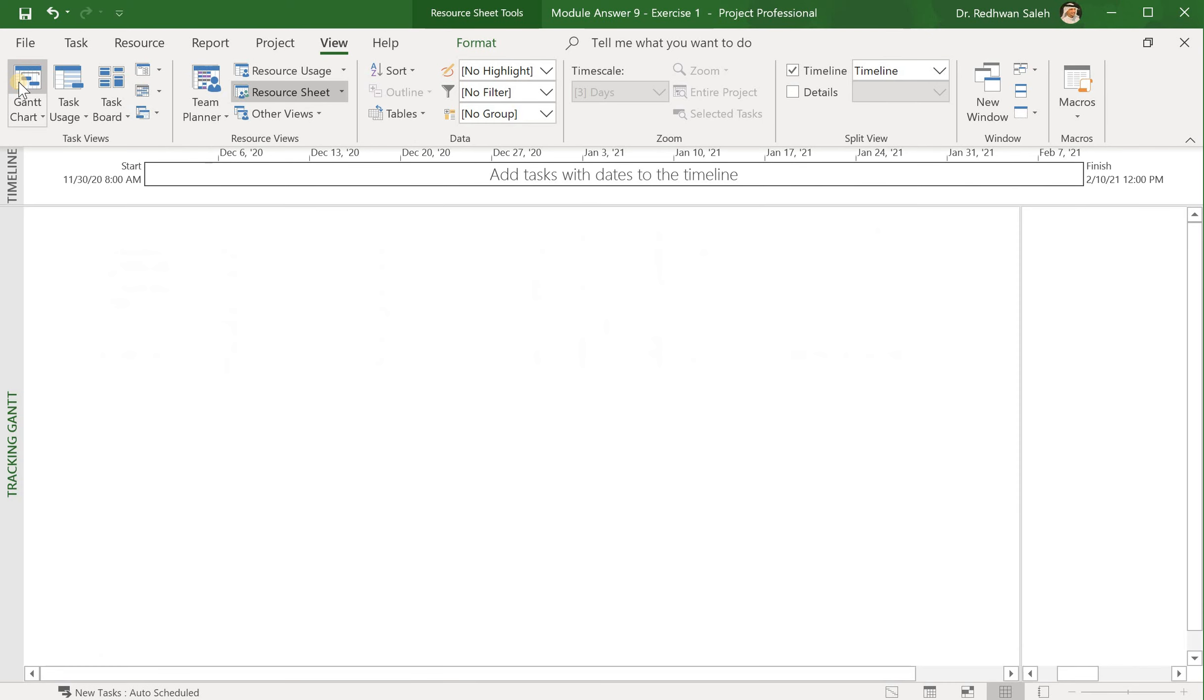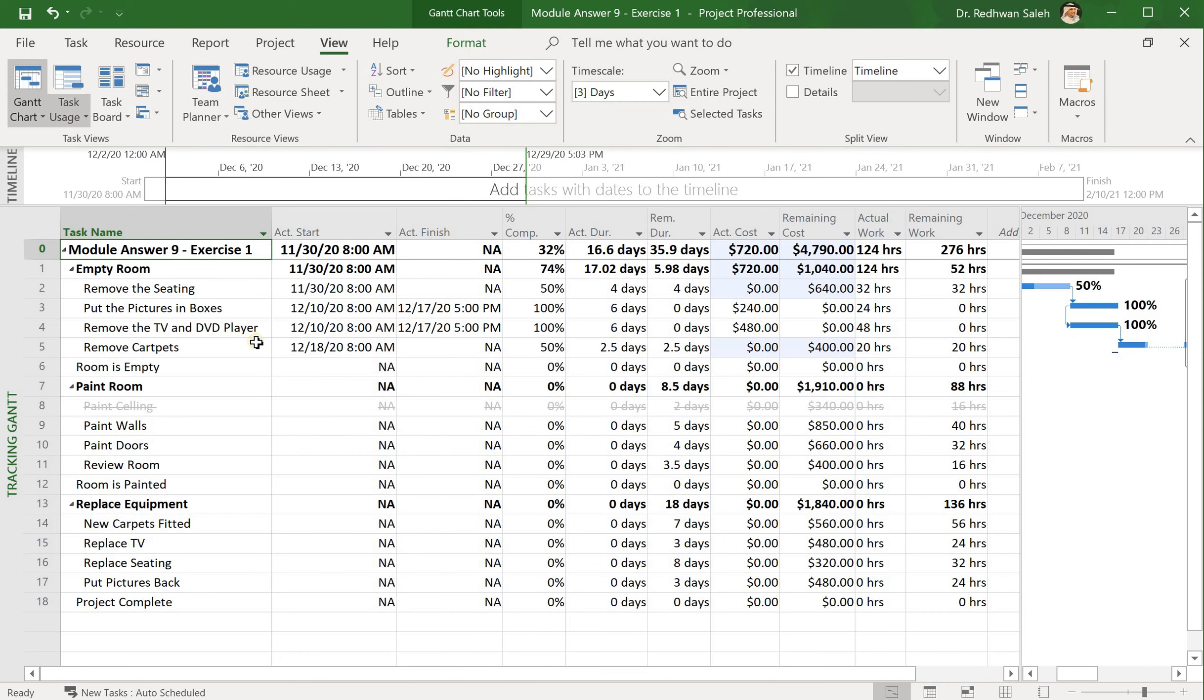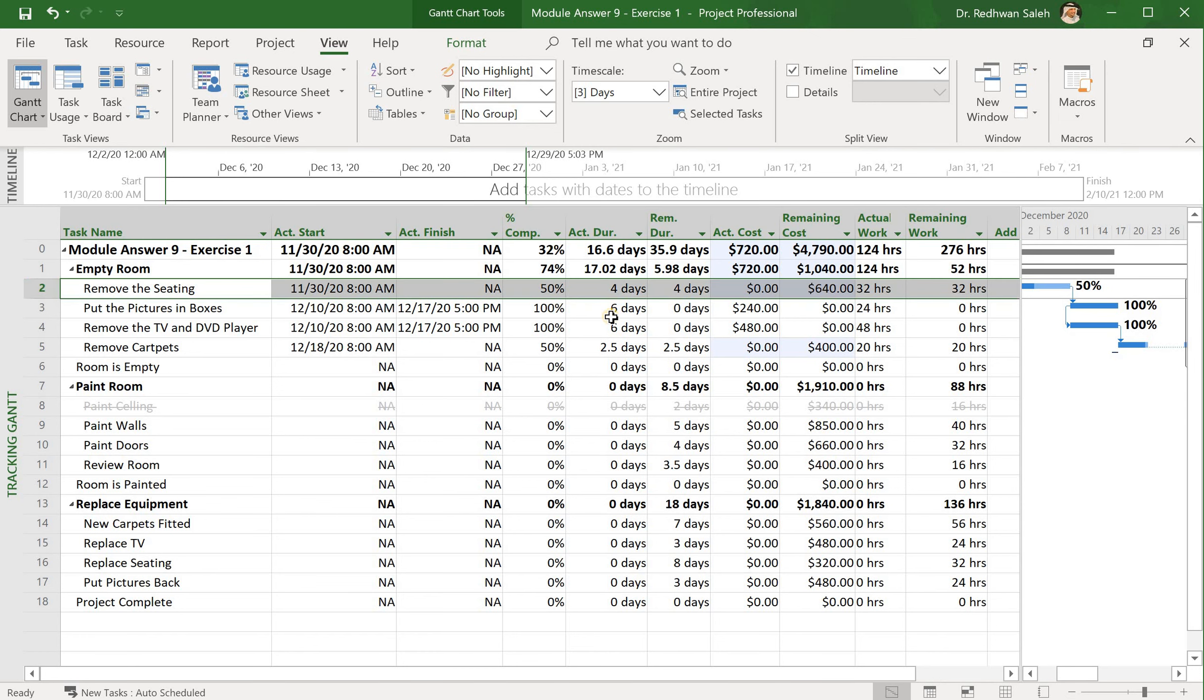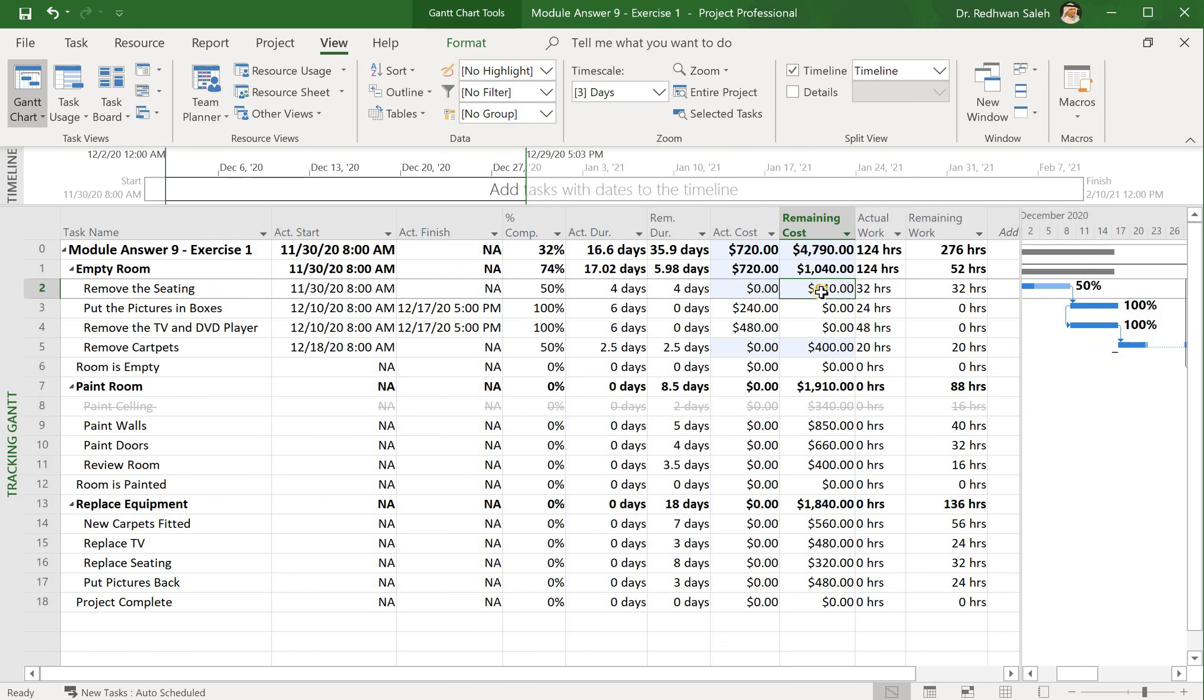You can see that task number two, I already finished 50% of the task but nothing has been allocated to my task. You haven't paid anything and it will be paid at the end of the task.